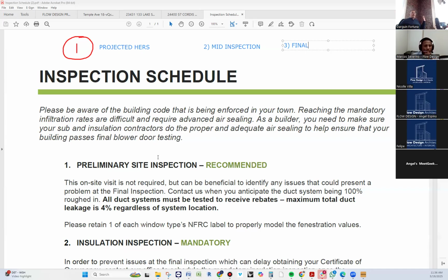They open a door. They put basically like a fabric on that door with one hole, and they start either blowing air into the house or sucking air outside of the house. What does that do? That tells them how much air is coming out of this house. Like if infinite air keeps coming out, it's because windows are open, things are problematic, this thing is not sealed. Right? If almost no air is coming out, that's very important for them because it means that it's tight. That's what they want. They want a very tight, almost watertight building. It's almost impossible to do that.